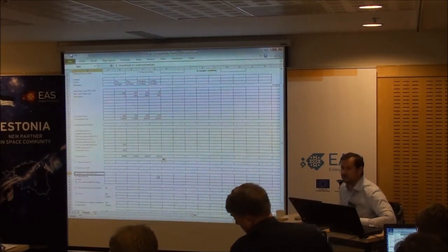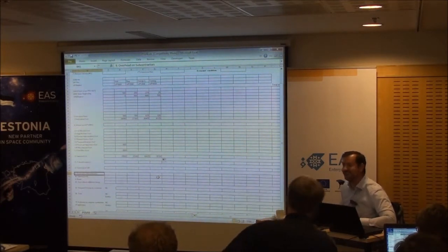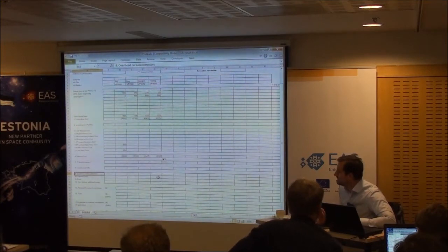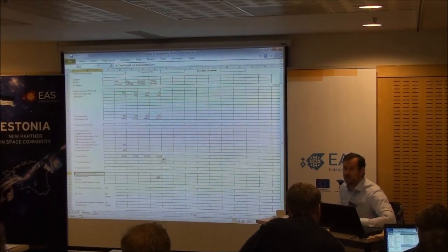It makes you not look so profitable. ESA in general doesn't like a large percentage of overhead on a sub, because it costs them money and they're not getting anything for it, basically. So you need to understand those commercials within your organisation.